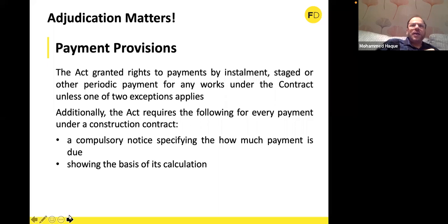Now, the payment during the interim installments can be one of two, or three, types. One is, obviously, for the measured works, or the works for which a price has been fixed and the performance of that has been done. Sometimes there is a wide-ranging mistake, I would say, among QSs. When there is a measured work price lump sum agreed at the beginning of the contract, and we have, let's say, a contract of 5 months duration, what the QSs do when they try to find out the entitlement for the month is, many a time, just divide by 5.